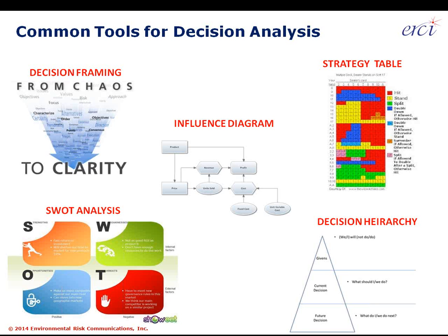An influence diagram in the center of the graphic refers to how pushing up or down on costs or control of one aspect of a strategy affects others. You may find that if you understand the cost of landfill disposal, great, that's one part. Landfill disposal costs plus transportation plus the unit costs for transportation, as well as the distance to the landfill.